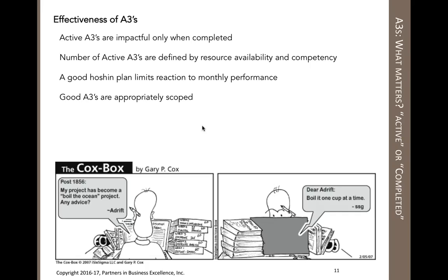That is done primarily to ensure the attention of the team to work on these implementation plans that are coming out of the A3. So clearly, 6 weeks allowed time to implement and complete the A3s, and defines really the scope of the A3, right? So we break them down into smaller chunks.